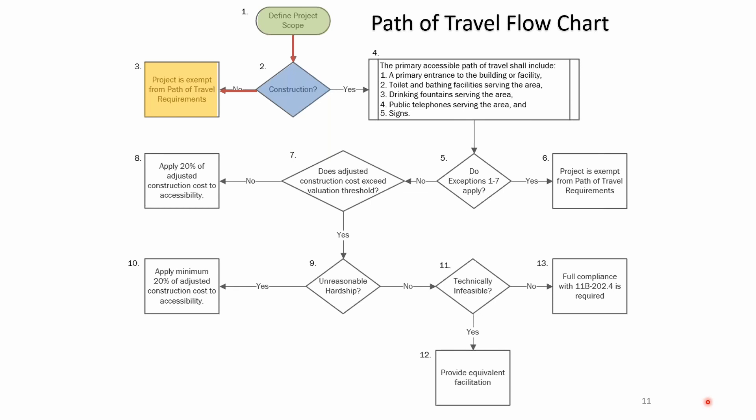In HCAI's interpretation, a change of use without construction will not trigger path of travel — that's a big deal. If you do have construction, that construction is what triggers the path of travel. The five path of travel items are: the primary entrance to the building, toilet and bathing facilities, drinking fountains, telephones, and signage — all of which would be triggered to comply with current code.